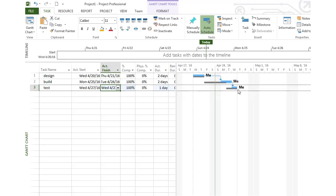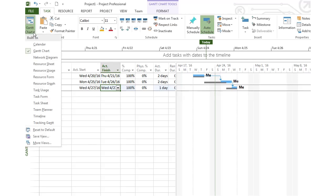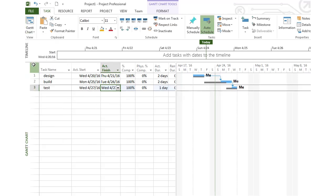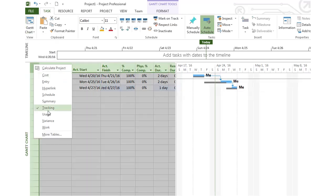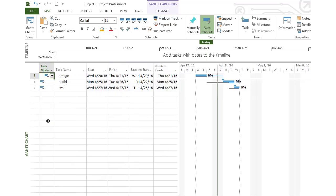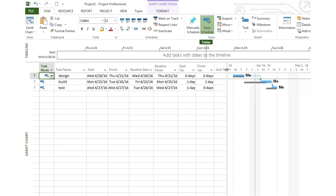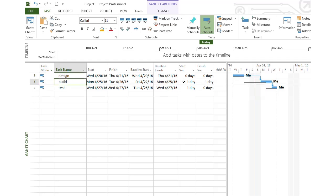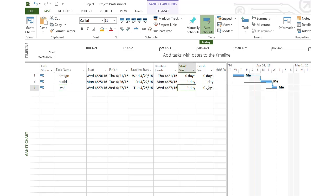Another thing we might want to look at on this Gantt chart is the variance. You can look at the variance by clicking in the upper left corner and choosing variance. The variance is the difference between our start date and the actual start date, like our guess and the real start, and our estimated finish versus the real finish. We can see that the second task, build, started a day late and finished a day late. But our test phase started a day late but then we finished right on track with our estimate. These could be negative variances too, if we ended up starting something earlier than we had planned to.